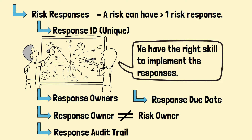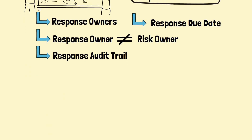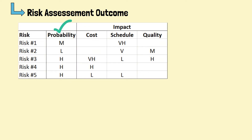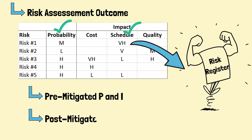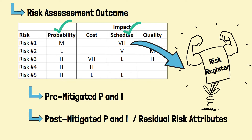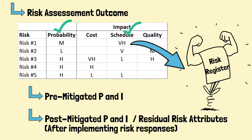Risk response audit trail should be made available for the response owners to update the progress, and the due date of risk response should be specified as well. The risk assessment outcome comprises the probability of occurrence, impacts on different goals, and severity of each risk. This essential information must be captured in the risk register. Sometimes we will capture pre-mitigated and also the post-mitigated probability and impacts. The post-mitigated, or residual risk attributes, are based on the best estimate from the team if the risk responses are implemented.